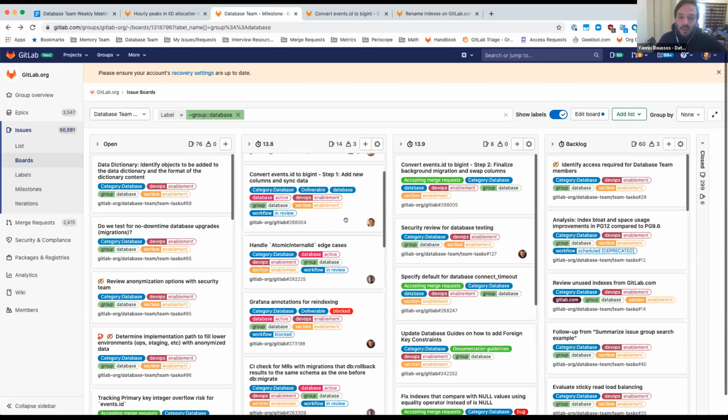There is one interesting thing here. We can test with production data, but we cannot test with production hardware. I know that running this query against Postgres AI, in the worst case, or a lot of times, it takes around 1.5 seconds to update 100 records. So if we go with that, we need 6 months. And if you click there, I have some very nice stats, like 130,000 jobs or something like that.